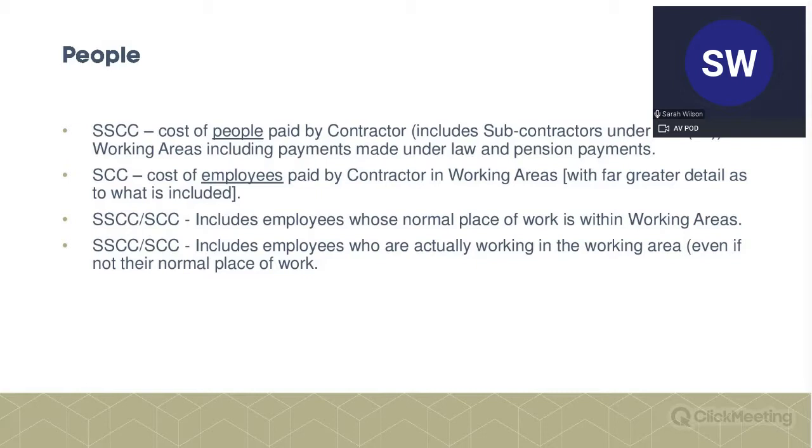So just to give you an idea, we've covered some of them. It also covers your overtime, fairly obvious, I think, and bonuses and incentives, again, fairly obvious. One of them is working in special circumstances. It covers absence due to sickness and holidays. It also includes payments made in relation to people for things like travel, board and lodging if you're having to work away, medicals, your death in service benefits. So there's all sorts of things.